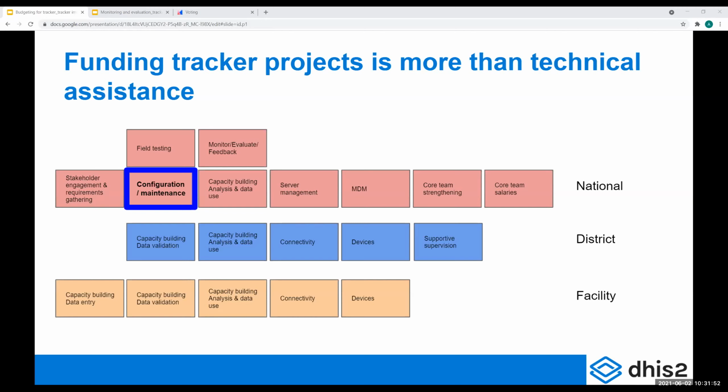Yeah. But sometimes inflation of the budget will make departments refrain from the implementation, but it should be split into phases. That is a very good question. If your budget numbers are way too high, you won't even get out of the starting blocks, right? Because people say that this is unrealistic. So maybe you should reduce the scope, make the project simpler with fewer moving parts. I don't really have a very good answer for this, but it's a very valid comment.